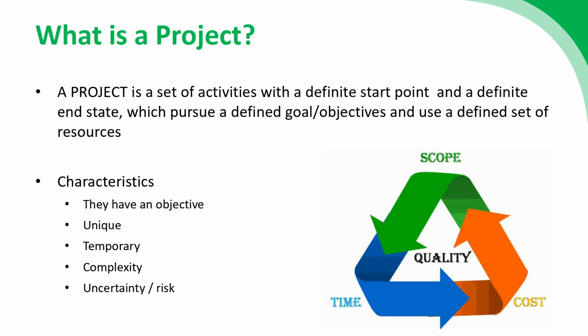The start point is the beginning of the process to redevelop the library. The end point, or the definite end state, is when the library is completed, and then we transition that into an ongoing operation. So to build the library is a project, to run the library is an operation.